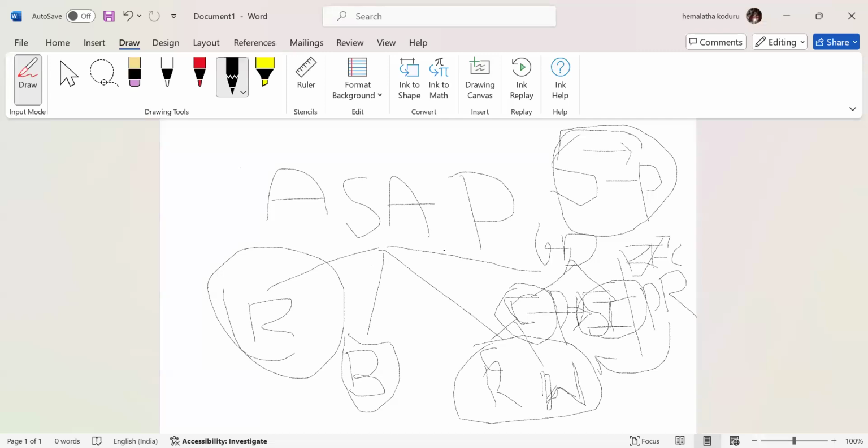In real time, we'll be having Solution Manager, and another one is HPQC and HPALM. HPQC is for defects: where you have done the implementation but still some bug fixes or errors are there in the configuration or technically, you'll raise defects in HPQC. The same will be implemented in the system. Again, you have to do the testing in the same manner I explained: integration testing, then UT testing, and then you move the changes to the actual system after confirmation from your user.